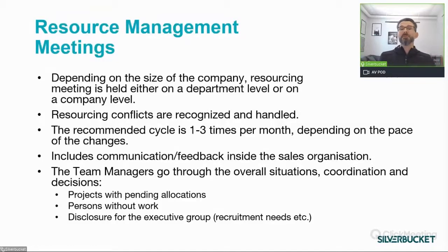The main purpose of the resource management meetings is to check possible conflicts in the resourcing plan. A conflict can be, for example, a situation if several project managers need the very same person in their project teams. This meeting should also be able to make final decisions in these cases.